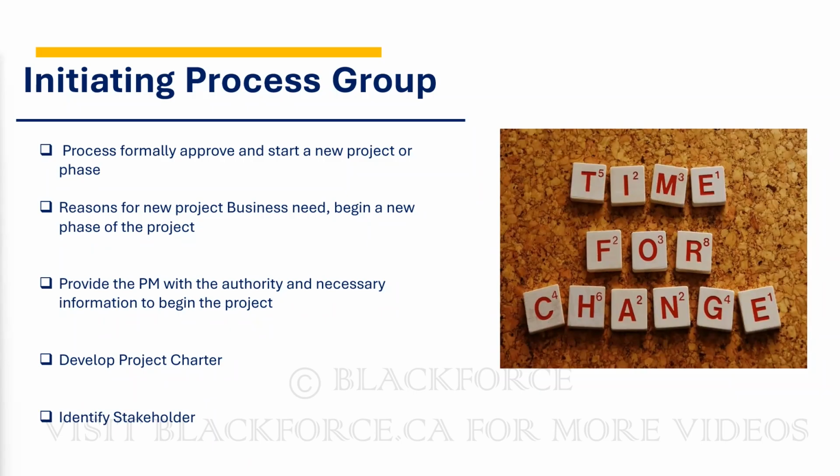So what are you doing when you identify stakeholders? Why do you need to identify stakeholders? Because you want to know if those people are going to be affected by your project, right? So if a stakeholder is going to be affected, maybe they don't want the project, you need to start planning how you are going to manage resistance, how you are going to be able to bring them on board. Some stakeholders will not have power right now. Before you know it, in the next 15 minutes, it can change.